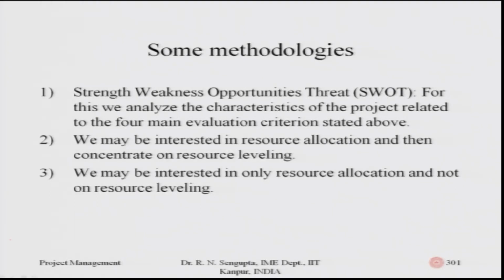We may be interested in resource allocation and then concentrate on resource leveling. It may be possible that time is a factor, so you have to use some extra resources to finish that work. We may be interested in only resource allocation and not in resource leveling. Resource allocation is done, while leveling means that you try to utilize the resources on an average even basis throughout the duration of the project.